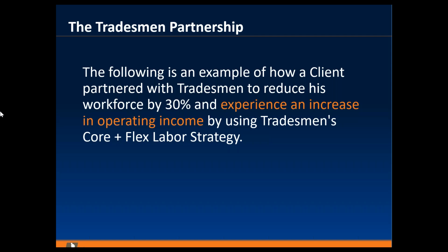And then obviously a lot of contractors do flex, as I did when I owned my own construction business. That was my seasonal or summer or cyclical help, typically in Western New York, where I owned my business. Obviously, as you can imagine, that was May through October. I ramped up probably an additional 10 on top of the 10 workers that I had and couldn't do without. Unfortunately, those 10 seasonal workers rarely made it past the holidays. So again, that causes that hire-dehire scenario, which is where this CORE+Flex strategy was born.